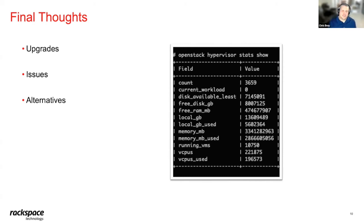But speaking specifically to the upgrade, that was a bit of a learning process as well. When you have this distributed computational levels within your environment, which one do you upgrade first? That's something that we were talking about and chewing over quite a bit. And we settled on upgrading the MCP first, that MCP layer. We do a quick sanity check to make sure everything's working, and then we can roll through each individual cell one at a time. That was the plan. That is actually the current plan.